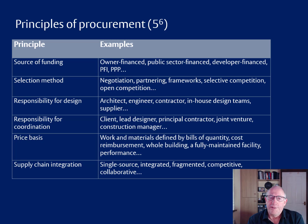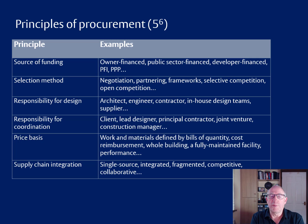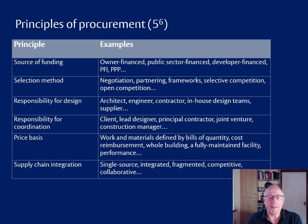If I were to tell you that my next building project is a design-build project, that only tells you something about responsibility for design and responsibility for coordination. It tells you nothing about the basis for calculating the price, where I'm getting the money from, how I was chosen, or what we're doing with supply chain integration. If the answer is a contracting method, it's an incomplete answer. You have to explain six things.